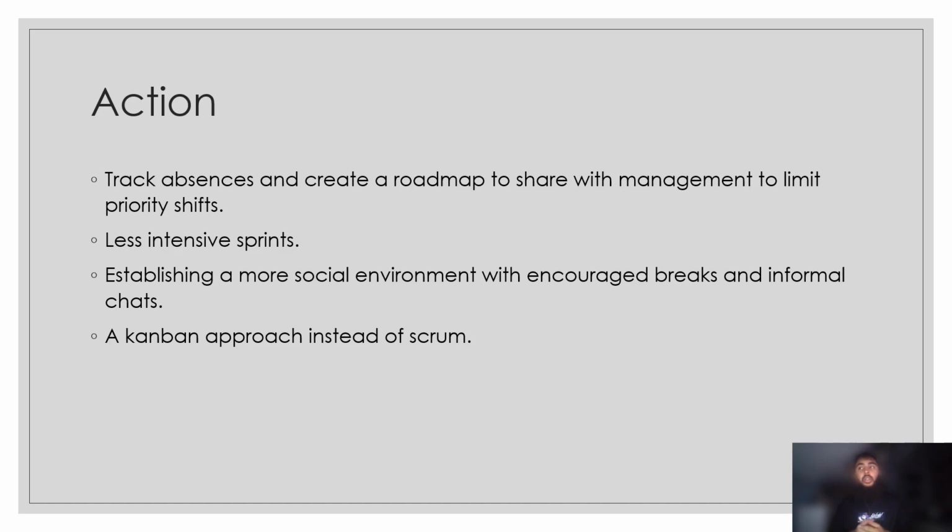And I think another good thing to do would be to use a Kanban style system. I think a Kanban approach can help you to limit the work in progress, so that you're not working on too many things at once, and you're ensuring really good quality, like 2 or 3 tickets at a time rather than 6 or 7.